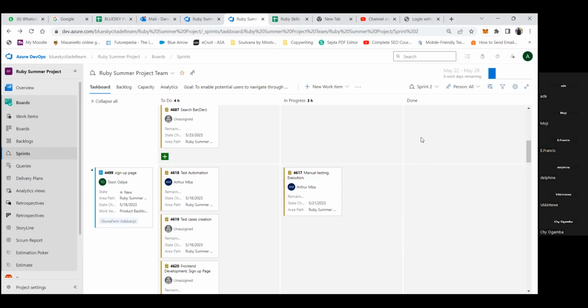Based on the numbers, when they're filling out the capacity, they're telling you that I'm at work this day, I'm able to do these hours this day, I'm able to do those hours that day. And that's what you use to work out each person's capacity for the sprint. You know, like we checked now, and it's 3 for Segun.